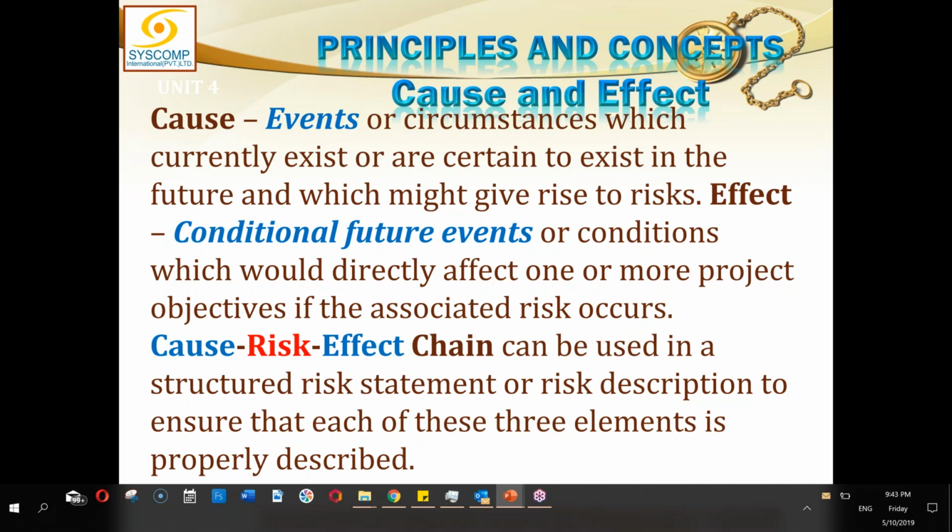So if we join this chain together, this becomes the cause, risk, effect chain. It can be used in a structured risk statement or risk description to ensure that each of these three elements is properly described. Normally, when I ask my students to tell me some of the risks they have in their project, they come up with very strange kinds of risks.